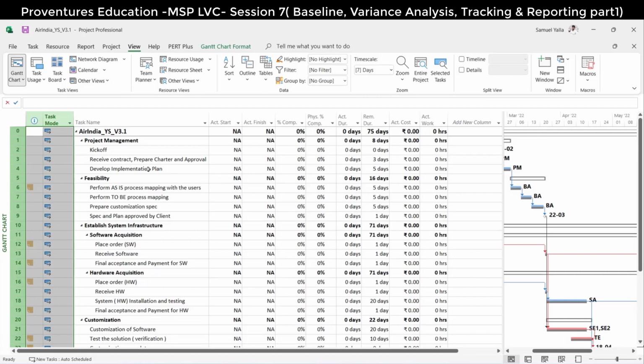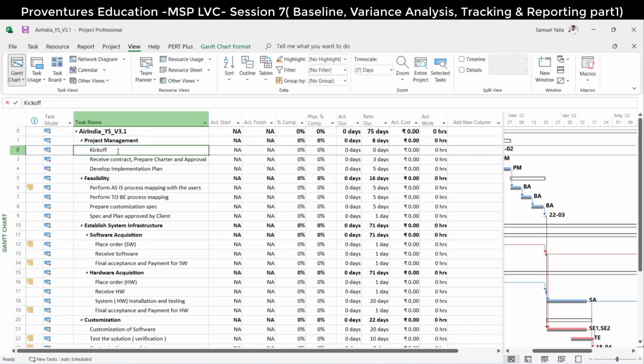Suddenly, if a summary activity is clicked accidentally, the mode will change, and all the calculations will change. So always keep these two columns just to see if any indicator is there, or if it has changed to manual scheduling or not. Always keep these enabled.